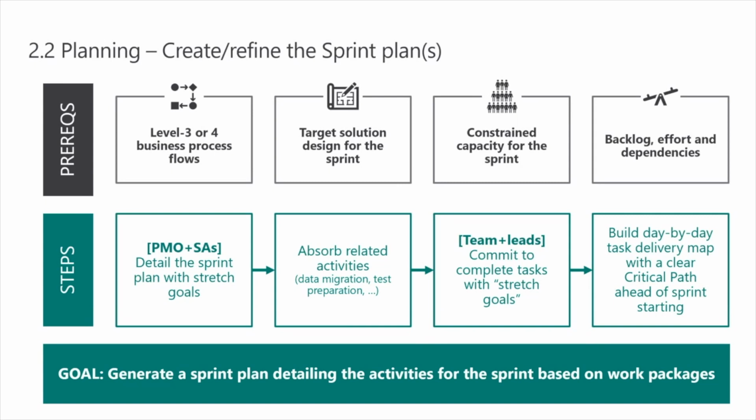In other words, in that sprint plan, you've got nothing there that says, this is a 60-day effort, because the chances of you being able to estimate something that takes 60 days across 4 people is relatively low, right? You're not going to be that accurate. Whereas if you've got a sprint plan which says, this is going to take me 2 days, this is half a day, this is a quarter of a day, you're much more likely to be accurate. You're much more likely to identify the right dependencies. You're much more likely to complete the task on time.